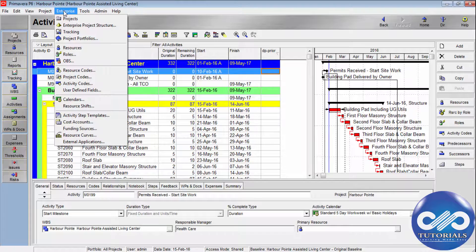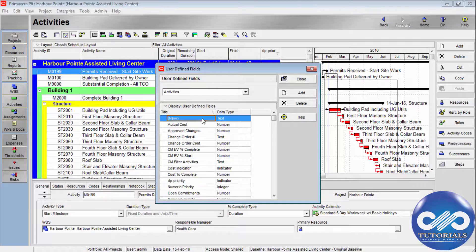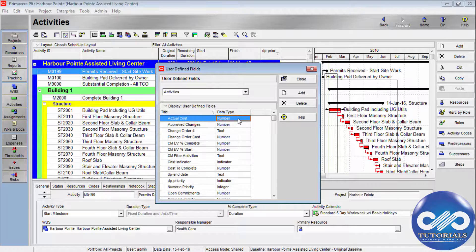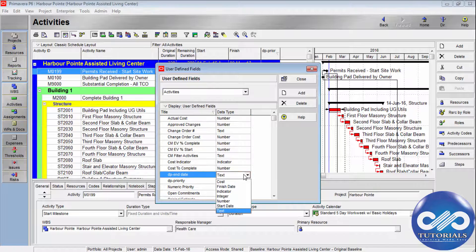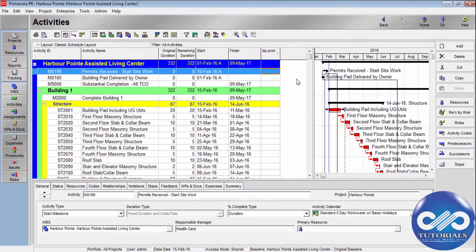To define them, go to the menu bar, click on Enterprise, and scroll down to User-Defined Fields. When you click it, you will see the subject title and data type in two columns. Click Add and enter your user-defined field name — for example, 'DPEnded'. Then select the data type; let's select Finish Date. The field has now been created. You can close this dialog box.